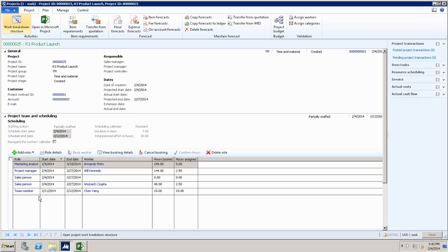It is just simply a grouping for competencies like skills, certification, and education. But when you sell resources, something should drive that. How much do they cost to you? How much do you sell them to customers? A senior consultant costs me $100 an hour, and I sell that for $250. I think it would be a good discussion if we can have your input into how that is modeled in your organizations. Where do you associate the pricing with resources?